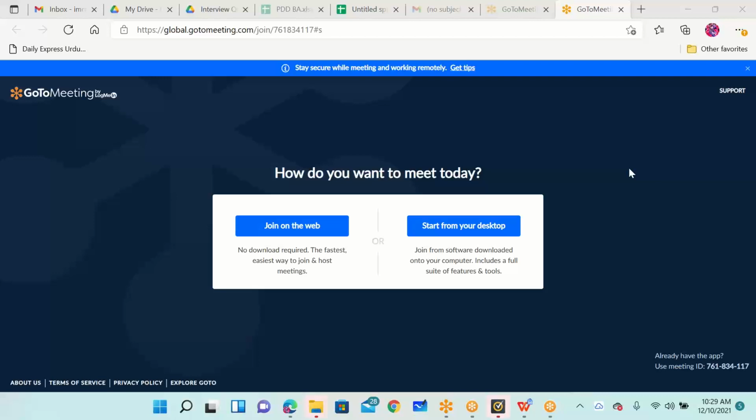My day starts at 9, so we usually go for the stand-up meeting. We check what activity is currently going on and who got stuck and what he did yesterday and what is today's goal. So after that, everyone goes back to their task, and I usually monitor, and if someone got stuck, I help them. I again go with the product owner to analyze the requirement again, and if he wants to change something, I raise a change management request. Very nice. And go through product backlog activities, see what is being prioritized, what are the next tasks to be delivered.